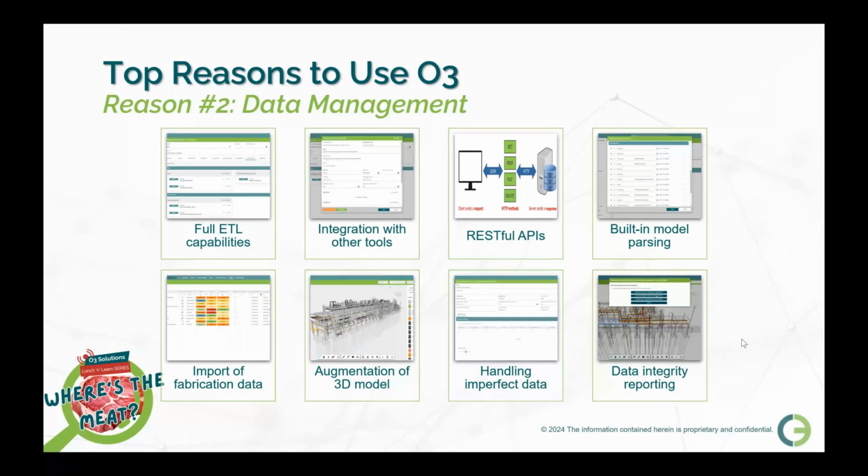We integrate very, very well with a lot of other tools. Like I said, on all of our projects, we typically integrate with document management, materials management, fabrication data, 3D model, timesheet data, completion software. There's a whole raft of things. So we can do that with a very simple Excel extract from that source system. Or with something like P6, we can take the XER file or an Excel extract, pull it into O3, and then your data exists in O3.